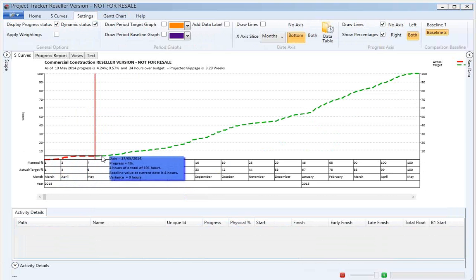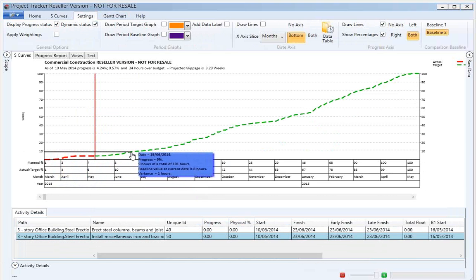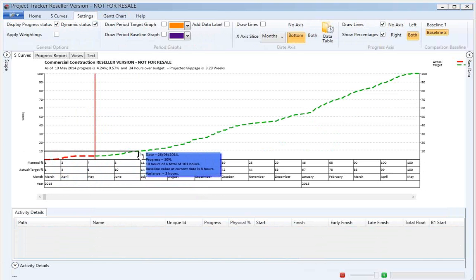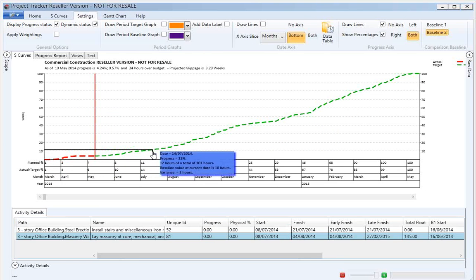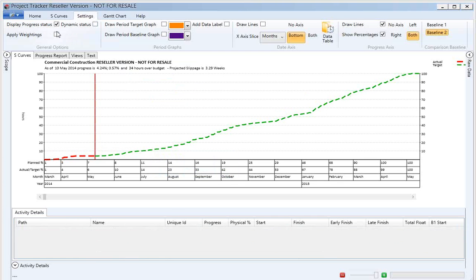And when we are looking, for example, at a specific period and which tasks will affect my progress, at the bottom we are seeing the remaining works and their list. So this is also good for quick analyzing in your project. This is called dynamic status. There is the weightage, like in Primavera, you are working, you are assigning the dummy cost or resource to manage weightage. Some tasks are very important or important resource or cost loaded, so you give them more weightage.